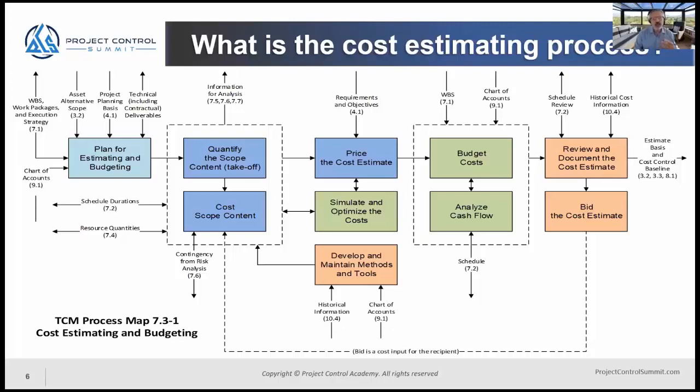And then we go through the pricing step, which is really adjusting those default costs for the unique site, commercial, or other project conditions. We'll have some iterative steps to try to optimize costs within our estimate, again, trying to support that decision making. And eventually we need to be able to translate the estimate into budgets to support project controls and specific contracting requirements.